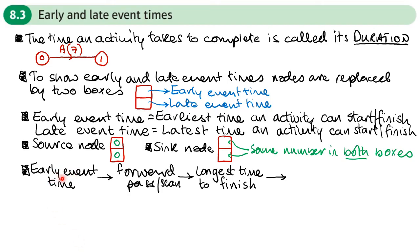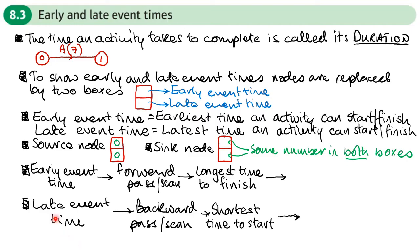To work out the early event time, we perform a forward pass or forward scan, working out the longest time to finish an activity. For the late event time, we perform a backward pass or scan, finding the shortest time to start an activity. A helpful phrase to remember: forward — high; backward — low.